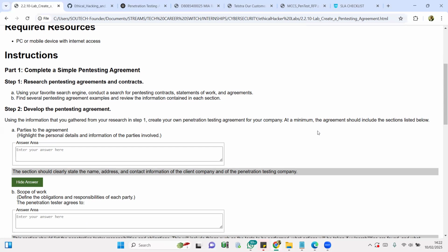You don't just write an agreement and send it to the client for the client to sign. There must be input either from the legal, from the HR, from the CTO, from who have the final say or who is responsible for such kind of test within that particular enterprise. So they must sign off before you can have a final document.